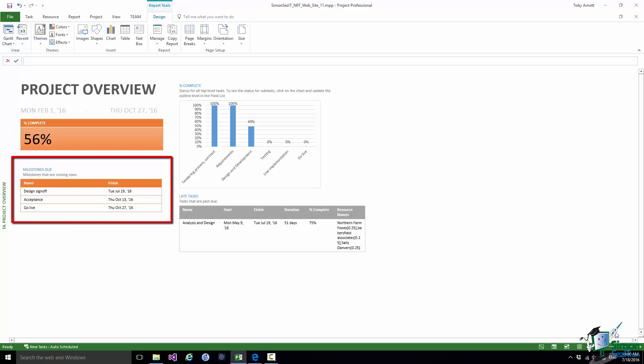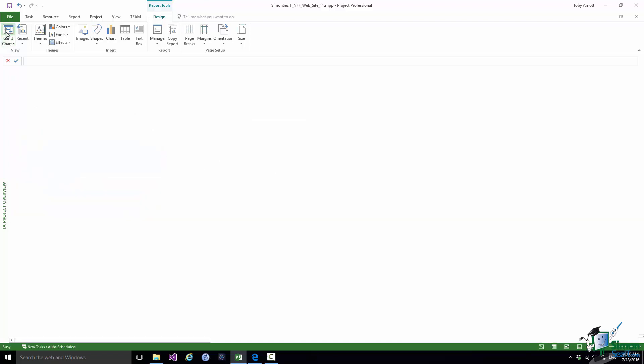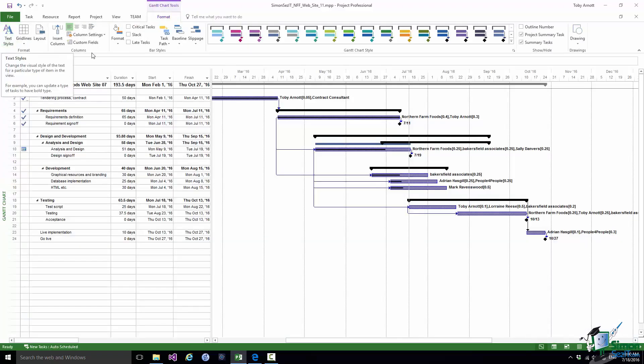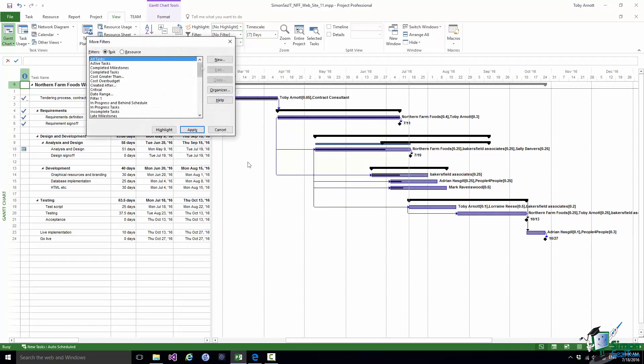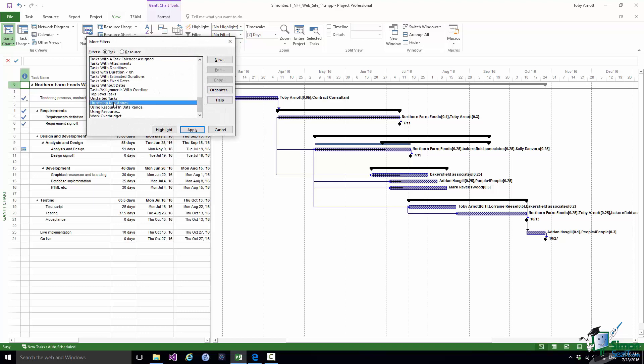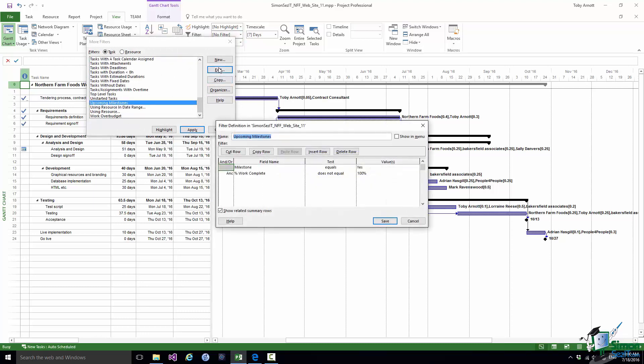Now you can't actually see directly from here what a filter does. But if you go back to Gantt Chart View, for example, and go to the View tab, go to Filters, More Filters, and go down to Upcoming Milestones and click on Edit, you can see that filter. The filter is made up of two conditions: first, milestone equals yes, and secondly, percent work complete isn't 100%. So we're looking for incomplete milestones. When it says Upcoming, that doesn't mean within a certain period of time, that just means any incomplete milestones. So we see all noncompleted milestones in this particular report.